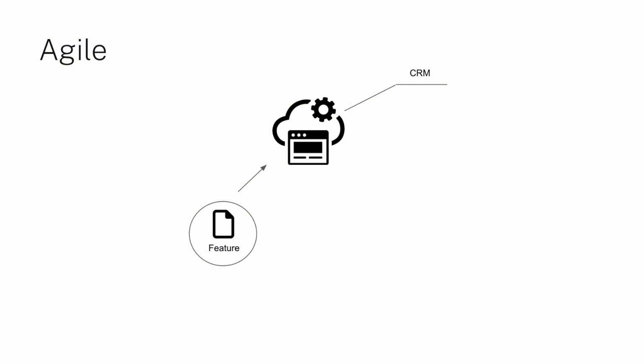So Waterfall concept says that users will be able to start using CRM in 1 year once all modules are developed and released. And now we are coming up to the Agile concept of the project delivery. Agile says that we can develop and release all modules independently. So firstly, we are developing payment module and releasing it, for example, like in 3 months. So users can already start using it.